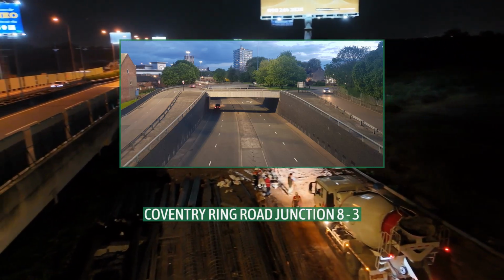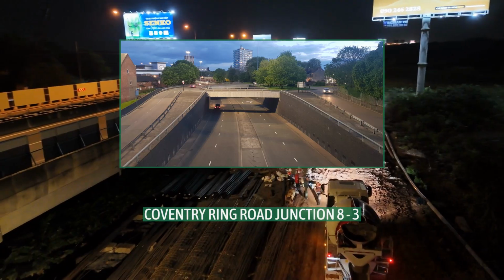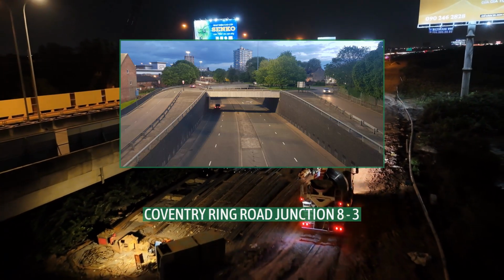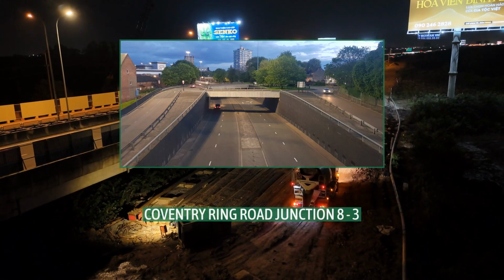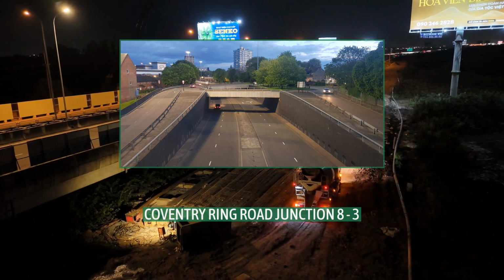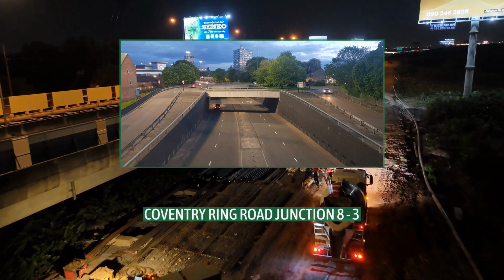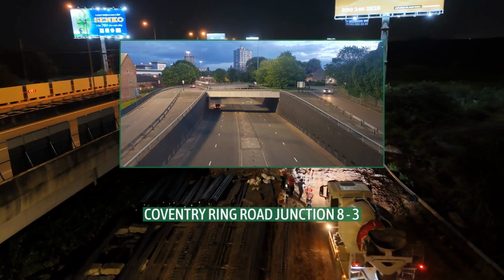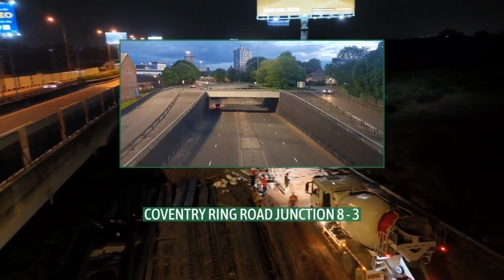Detailed plans for the stage were released in June 1965 during the construction of Stages 3 and 4, with compulsory purchase orders for the properties on the route issued at the same time. The contract for the construction of the project was put out to tender in late 1966, with Galliford chosen once again. Demolition and clearing of the route was underway by late 1967, and a £3.2 million MOT grant was approved, despite a government freeze on public spending at the time. It was projected to take 2.5 years to complete.